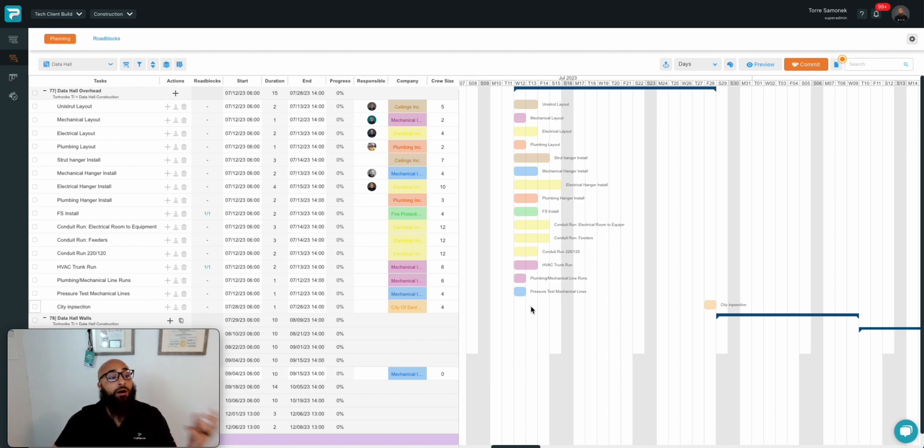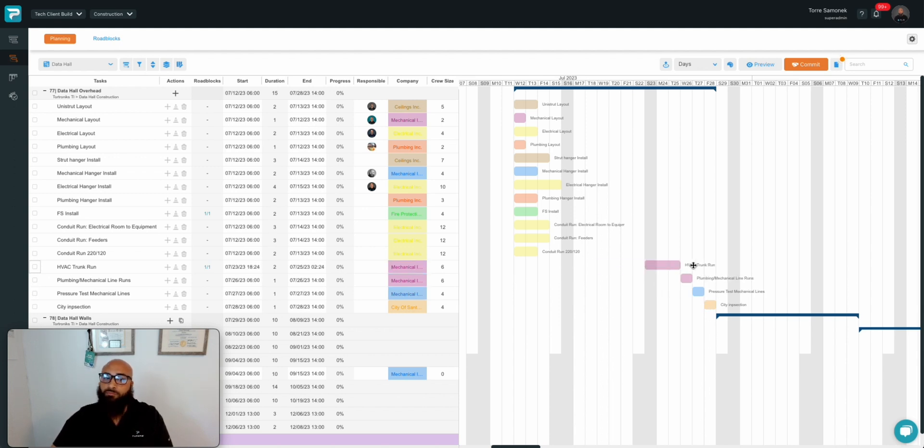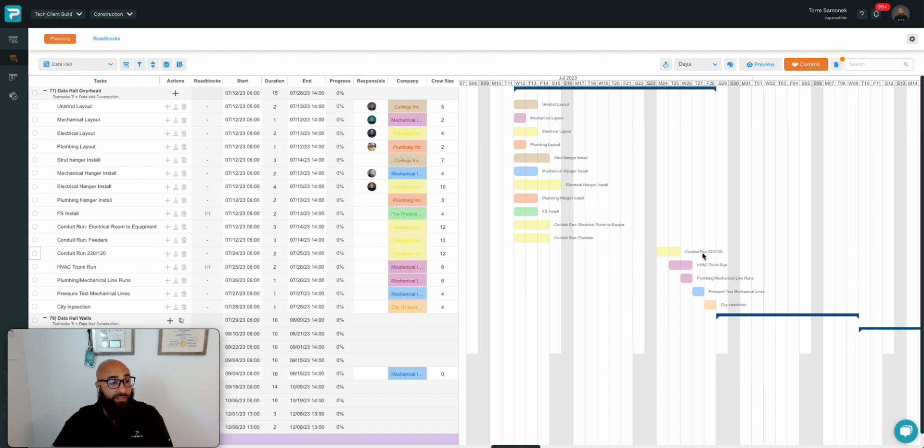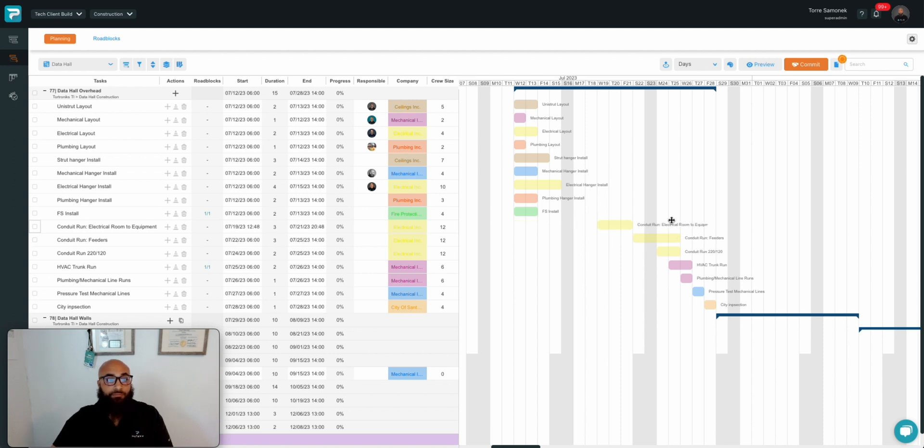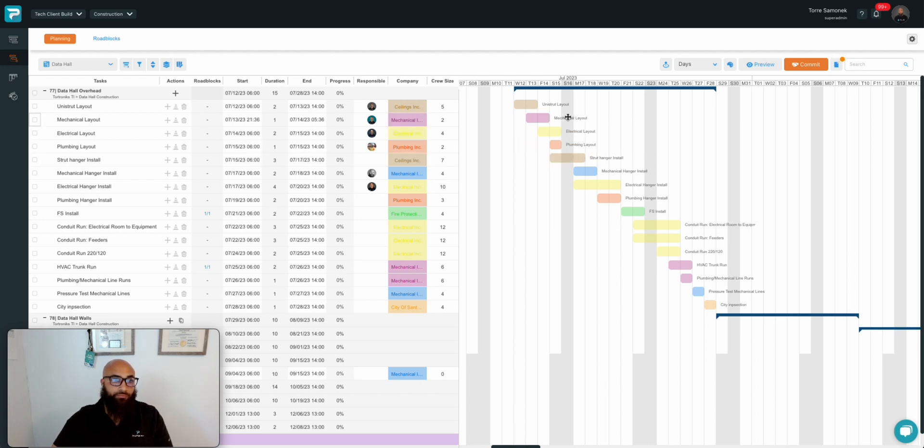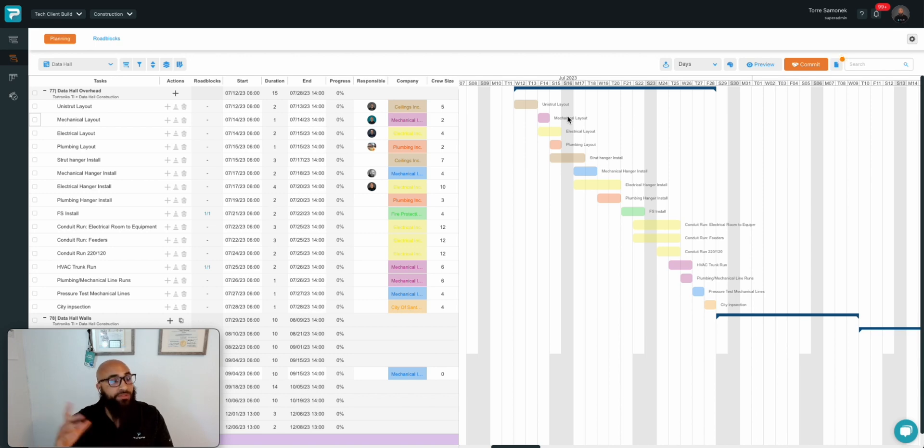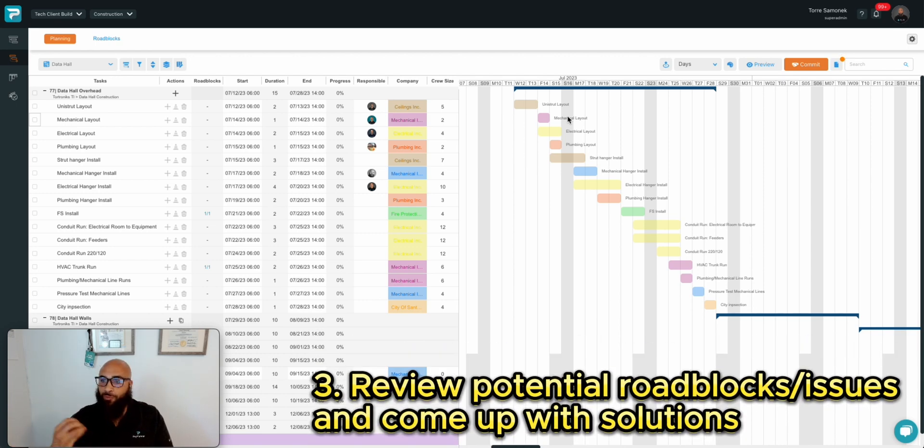That's sort of the benefit of collaborating with your trade partners on a web-based platform with unlimited users. We're going to go ahead and sequence this work. In some cases, we can have multiple trades working in the same area. But where that's not the case, we'll need to give folks some space. For now, we're going to call this a sequence that we're okay with, and we'll use this as the foundation for the next part of the conversation as we move into step three, which is reviewing potential roadblocks or issues and coming up with solutions.